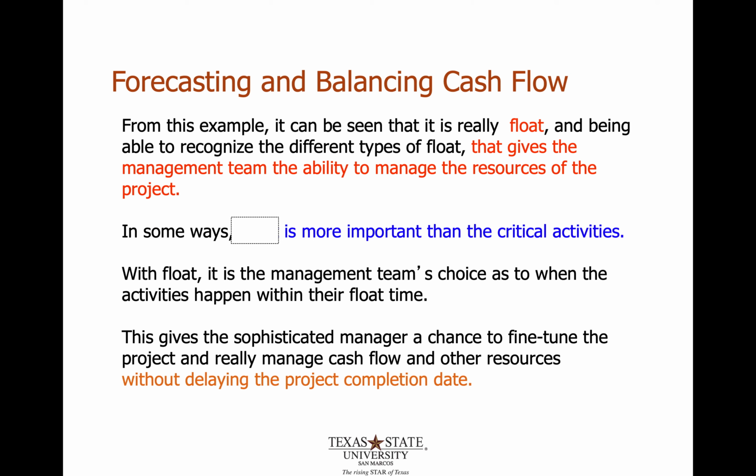And so we could see from this example that float is the biggest tool, like I said in the earlier slides. It's a real big tool to help us. So in some ways, float is more important than these actual critical activities itself, because you can't move those critical activities around without having to redo the entire logic of the schedule. So with float, it's the management team's choice as to when the activities happen within their float time, because they have wiggle room to move around.